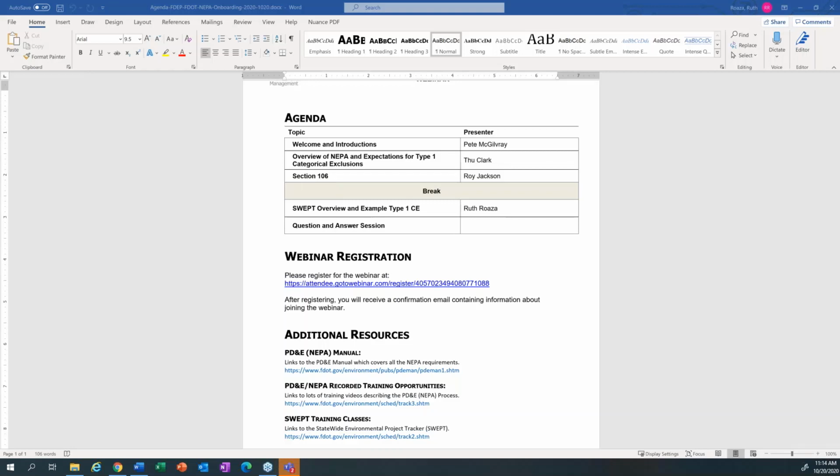Okay, perfect. Thank you. Regarding wildlife natural resources for the grant project that we currently have, we use FNAI to acquire these inventories. Is that no longer acceptable? I think FNAI is one of those resources, but when it comes to protected species, federally listed species, definitely reach out to U.S. Fish and Wildlife Service and their resources and National Marine Fisheries Service to get the exact list in your project area.